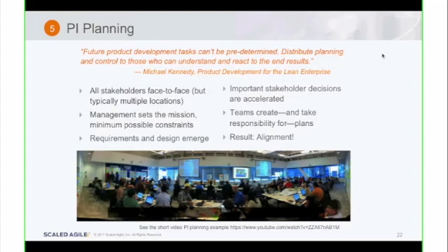So you get this chicken and the egg issue when you're trying to plan, and if you just assume that, well, we're depending on this API team to add a parameter to this call, and they're going to do that. And then it turns out that there's 40 other teams that have similar kinds of dependencies on the API team, but they don't discover that until commitments have been made, right?